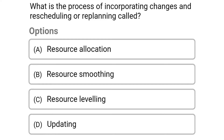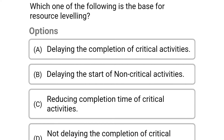Next question: what is the process of incorporating changes in scheduling or replanning called? Option A: resource allocation, option B: resource smoothening, option C: resource leveling, option D: updating. The correct answer is option D: updating.